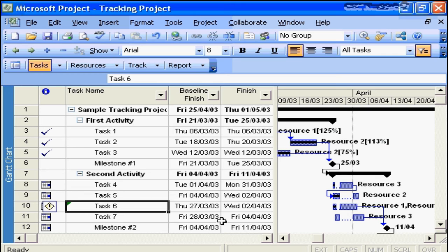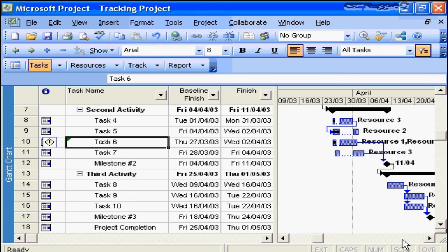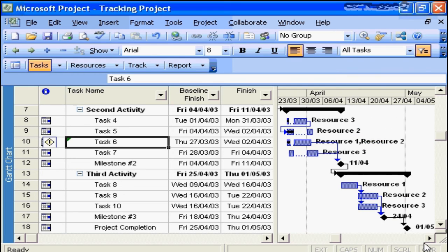We look at task number 7. Well, there's not much we can do to that. That's already pretty aggressive. And we begin to look forward in our project saying, what else can we do to improve our project delivery situation? And we look at tasks 8, 9, and 10. They're all relatively short tasks, so adding additional resources probably doesn't make a lot of work.